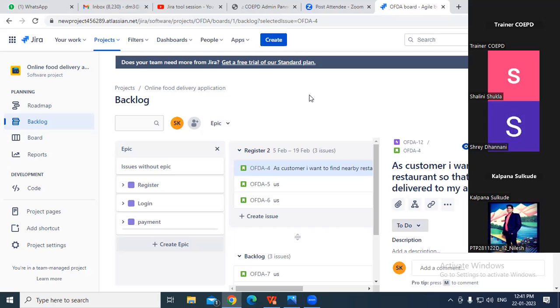Here we can add user stories if there is a change in requirements? No, generally, if the sprint has started, we don't add new user stories, because again we have to do the planning and everything will be disturbed. You create a new sprint. But it also matters, ma'am, if we are at the very start of the sprint, we can remove some user story from that sprint.